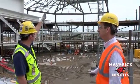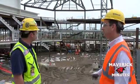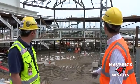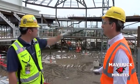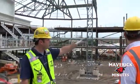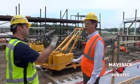All these T1 trusses are a little bit shorter. I believe they're 190 feet, probably 50,000 pounds less. I don't remember the exact weight right off hand. So then we got those. We'll continue those on for the next few bays, and then there'll be a T2 truss down at the other end of the bowl, and we'll move the cranes outside the arena and set the remainder of the secondary trusses from there.